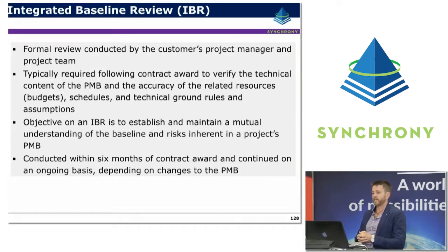So it's typically conducted within 6 months of a contract award and is often continued on an ongoing basis as a surveillance review or some similar type of review. If you remember earlier, we spoke about establishing the PMB. The better your collaboration is, and the better you've documented your assumptions and understood your scope of work, obviously the more robust that PMB is going to be, and the better that it's going to stand up to one of these IBRs or baseline reviews.